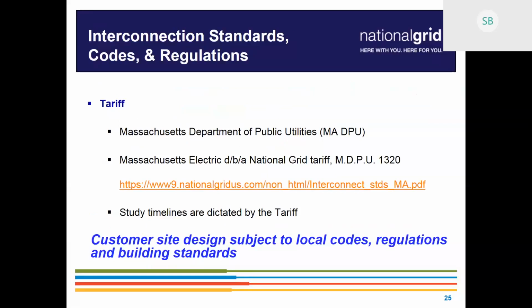So for instance, 3V0 or substation upgrades, such as replacing a substation transformer or any significant line reconductoring that you wouldn't otherwise be aware of. Those are the types of things we tell you up front so that you'll know early and be able to make a decision: this project, we know it's going to be too expensive, might not make sense to move forward, or it looks like it's still viable, and we're comfortable with what's happening. We can move forward at that time.